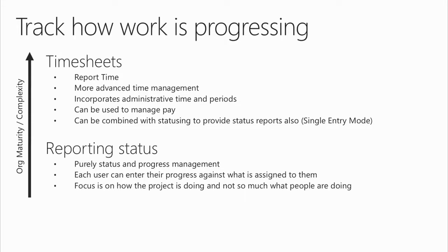The idea behind it is that you could have a contract with a company where you tell them, we're going to bill you for 40 hours. And that's it. You can't bill them more than 40 hours because you promised it's going to take 40 hours. Your status of the project could go to 60 hours. But the billing system, which is from the timesheets, maxes out at the 40 hours, and now you start tracking the progress in your project, and that thing is going over, but they're kind of separate.